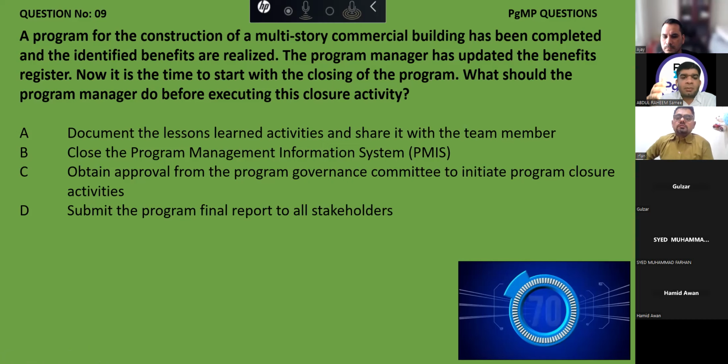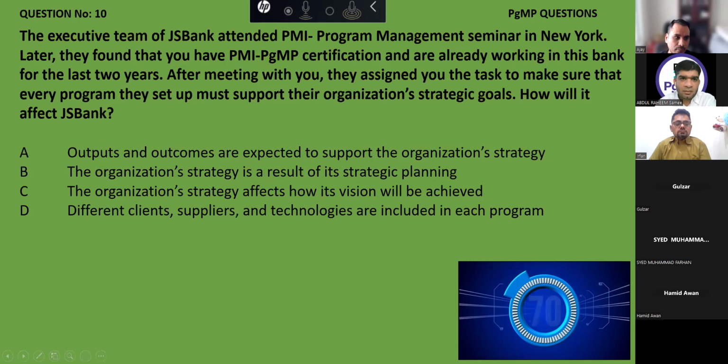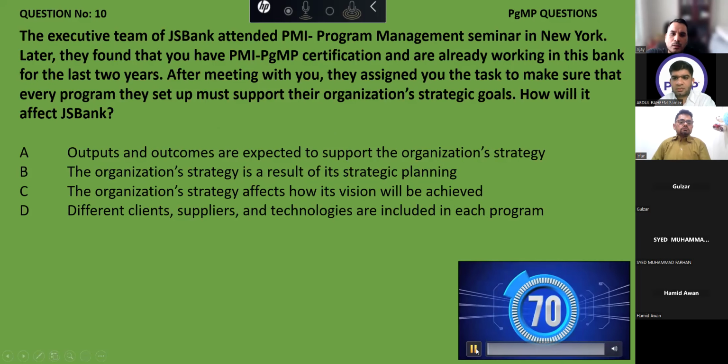But here, as we are talking about the program, and a program will have multiple components and multiple projects under it, each project will contribute to the lesson learned. And if you're talking about the program domain, then once the complete program is closed, we have to compile all the lesson learned. So here he's talking about the program being complete. Okay, so this is more of a summary and repository of the lesson learned. Yes, throughout the program and components, not just documenting what you have learned. Okay, thank you. Last question.